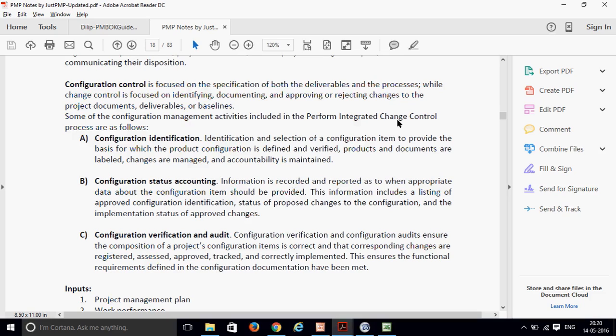So because it is a configuration control, change is a part of the integrated change control, but that will be considered as a configuration change. The reason is that if a specification was something like version 1.0, it can take that much amperage. Now the customer wants to change it to 80, but it can affect the whole design, right? Because you're changing the configuration, that change is very important. So these configuration changes will go through a different process, which is considered configuration control.